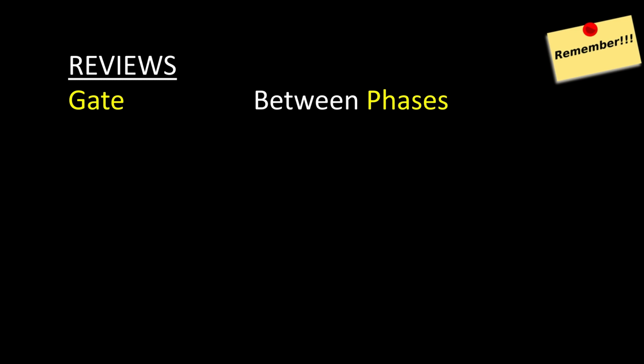To give another more detailed example, after the concept phase, we have produced a business case. The business case says this is what we want to do, here are the expected benefits, and here are the costs and associated disruption with actually going ahead and doing this project. So before we just plow on and start planning how we're going to deliver that and start doing things, we should stop, think, have a gate review that says, let's look at the benefits we get versus the cost and disruption of doing the project and make an informed decision whether we should proceed or not. And it might be, yes, we want to proceed, but in a different direction. So that gate review is really important. It stops us charging ahead when we shouldn't, saves money, saves time, makes sure we're considering all of the possible outcomes of what we're trying to do.